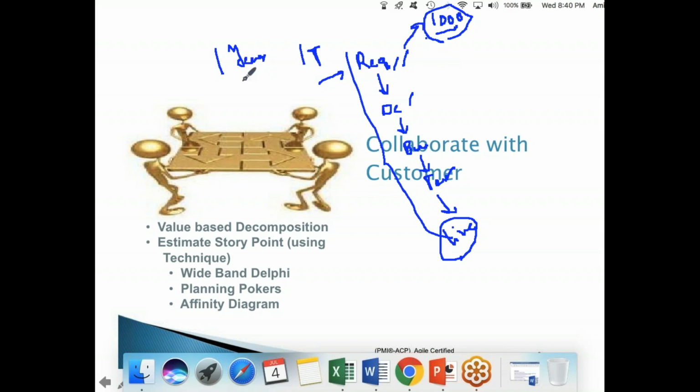And tentatively I agree, hey, with these requirements, it may take 1 year. It's tentative. It's not fixed, right? Tentatively 1 year. Within this 1 year, whatever requirements you want, I will deliver. You need not give me all the requirements at one go. Initially you give me some 20 requirements of high priority, and let me deliver that. I will gather only those requirements which are of high priority, which are a must in any e-commerce site.